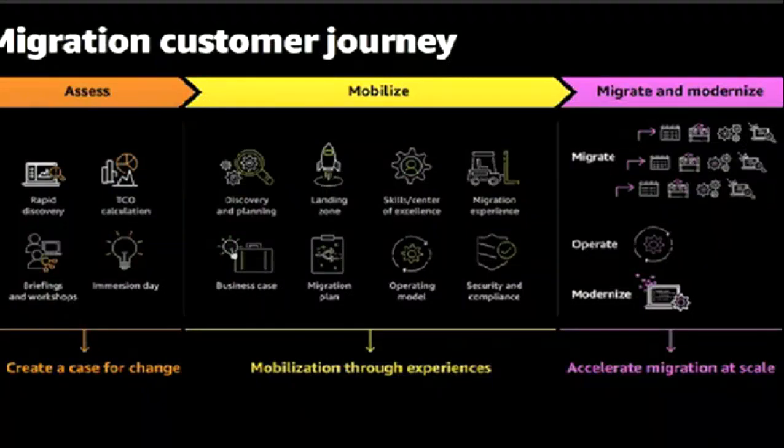On migrations, a very typical cloud migration has three different phases. Phase one is assessment, which assesses what assets you have, both digital and physical, and classifies and discovers them. Evaluate the risk. After the assessment is done, you should be able to create a business case and also create some plans.